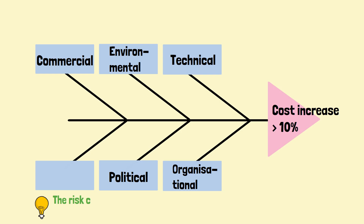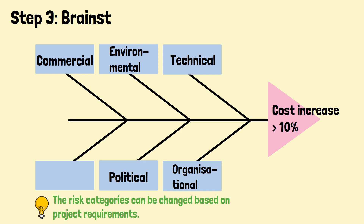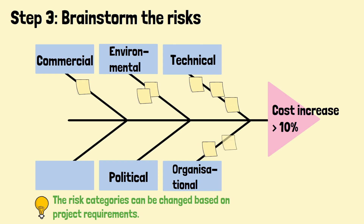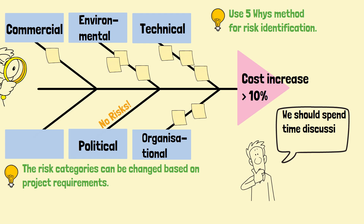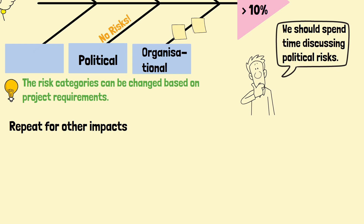Step 3: Brainstorm the risks. All the risks identified can be put onto the different categories on the diagram. The 5 Whys technique can be used to trigger more risk discussion. Before ending the risk session, the participants should have a look at the diagram. If the numbers of risks in certain categories are lean, the participants need to spend some time to exhaust the risks in these categories. The process will be repeated for different risk events or impacts.